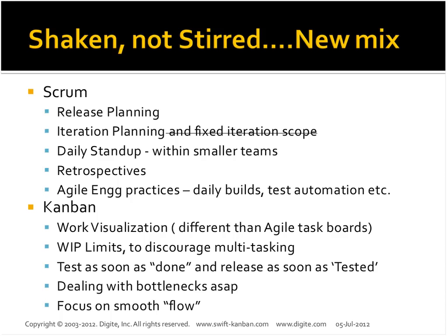Daily stand-up could be retained because it's a very good practice for agile teams. You could continue with retrospective. You can bring in a lot more agile engineering practices. But along with that, you can take up some of the elements of Kanban, such as visualizing the entire value stream of the work stream that you've been managing. You try to limit the work in progress that the team members are working on, and discourage multitasking with them.